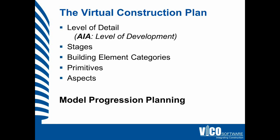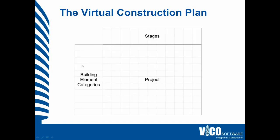So when we develop the virtual construction plan, just like when we plan for actual construction, we create a model progression plan that includes these items and we start to refer to the primitives. We start off by defining the categories that we would like to recognize in the project — the building element categories are shown here to the left.